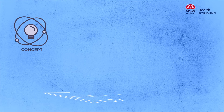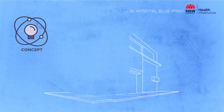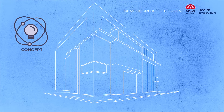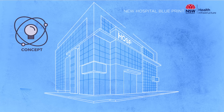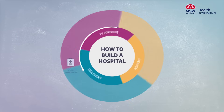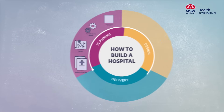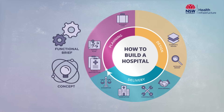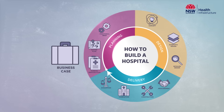Information collected during this early planning phase enables us to create a high-level concept design. The concept design demonstrates the relationships between the clinical functions, services, buildings and other facilities both horizontally and vertically. We combine information gathered from the Clinical Services Plan, Master Planning and the Concept Design to develop a business case.